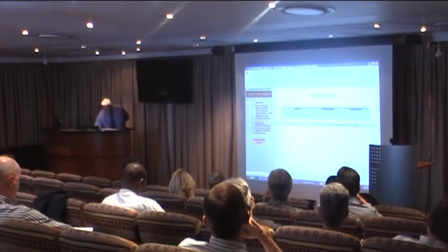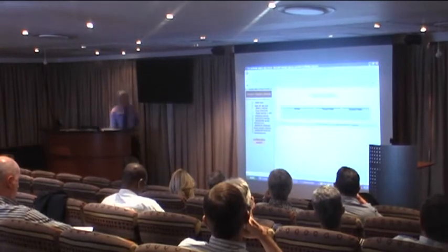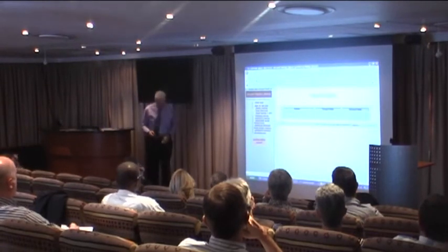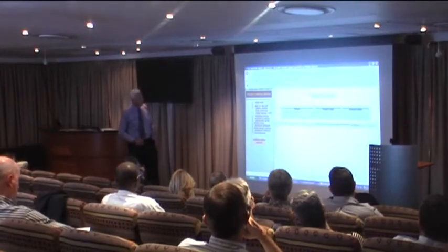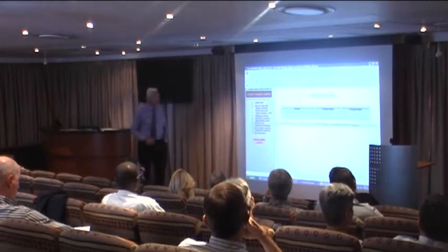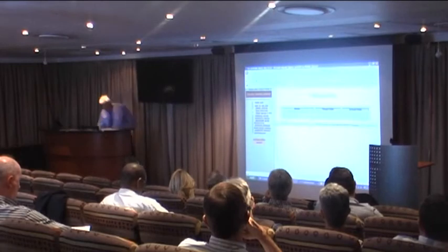And then there's a database associated with this, so we can put in the significant dates. As we run through the project, we can put the target dates and the actual dates that these things happened. The milestone dates.